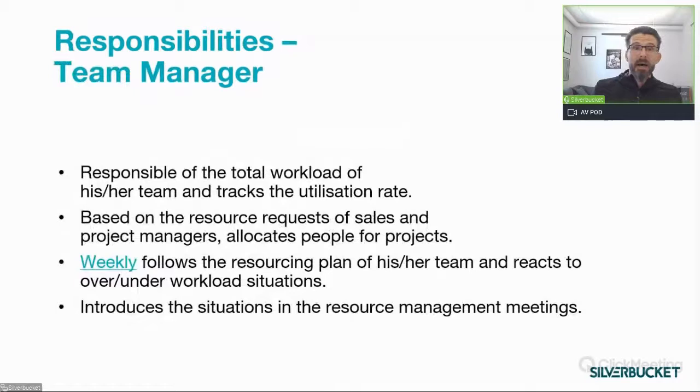Then, about the responsibilities of the team managers. The most important task of the team managers is to monitor the total workload of the team and follow the utilization rate. The team managers are also handling the resourcing requests made by the sales managers and the project managers. Based on these requests, the team managers are assigning people to the project teams, replacing the role-based allocations with named allocations.